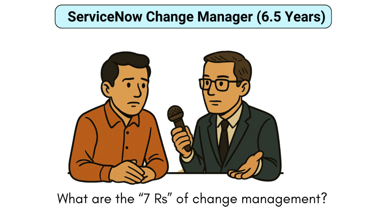What are the 7 Rs of change management? Okay, so the 7 Rs of change management are: who Raised the change — that is Raised; what is the Reason for it; what Return is expected; what Risks are involved; what Resources are needed; who is Responsible for execution; and finally, are there Relationships with other changes? So these are the 7 Rs of change management.